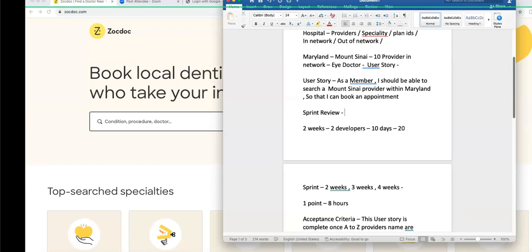That time all the team members will be there. So that time you can ask. No, it's not your job. It's a product owner's job. Creating user stories with all the description and acceptance criteria, that's fine. But giving points, because you don't know how long it's going to take for them to code. So the product owner is the one who needs to. Everybody will be there in the call: product owner, scrum master, you, developers, testers.